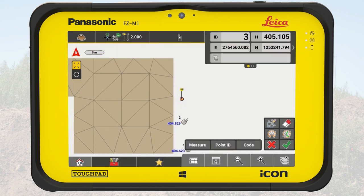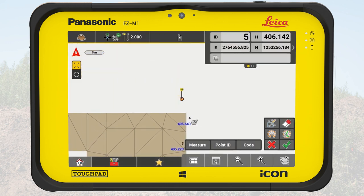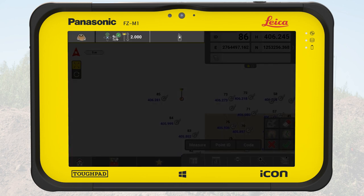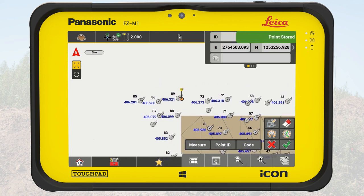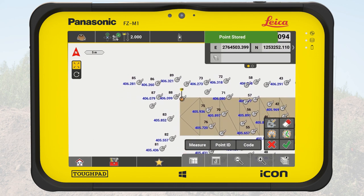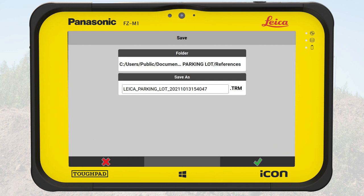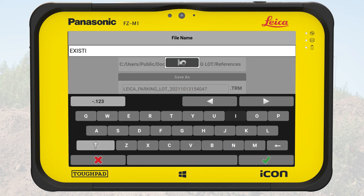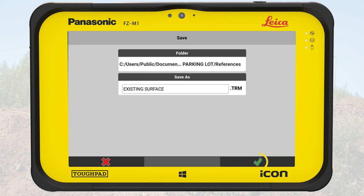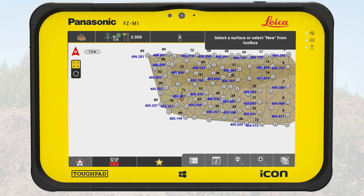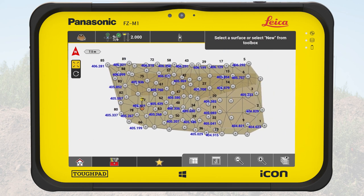We survey the whole field and store points in a rough regular grid. We tap on OK and give a name in the Save As screen. We tap OK again to finally create and store the surface. Back on the map, we see the created surface.